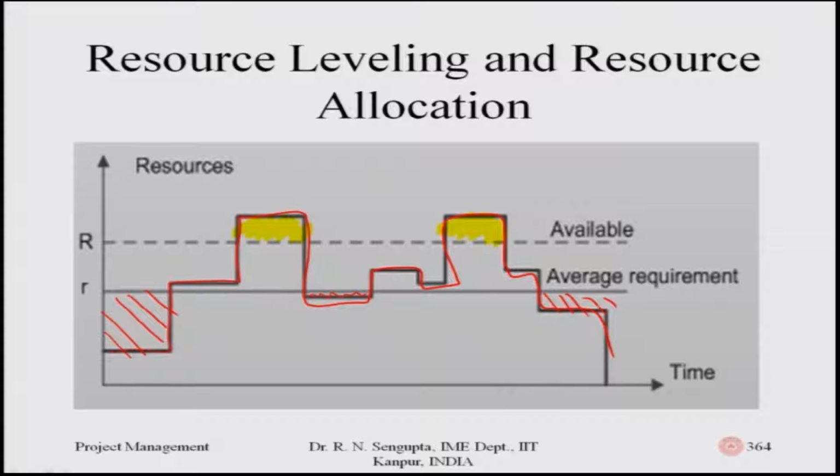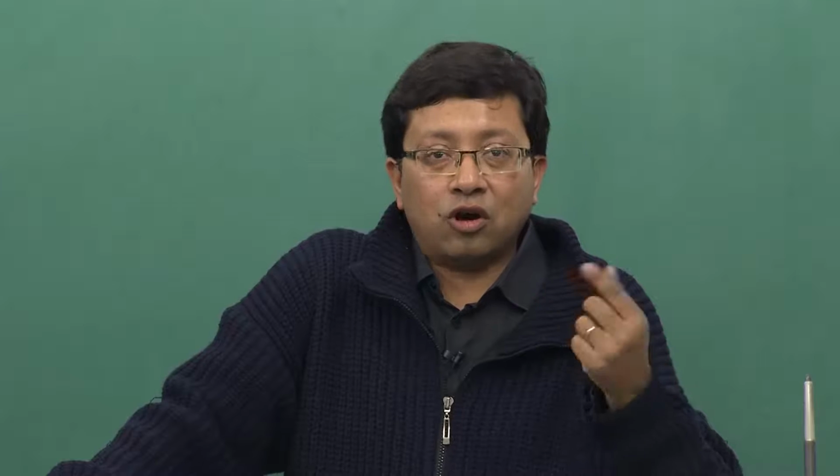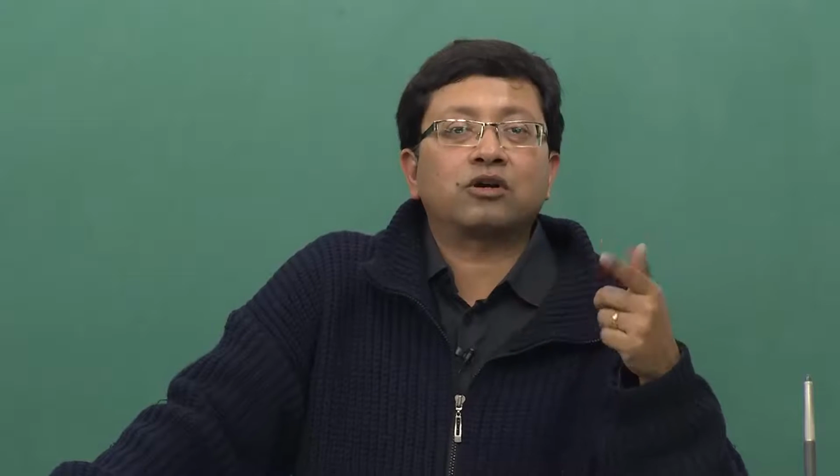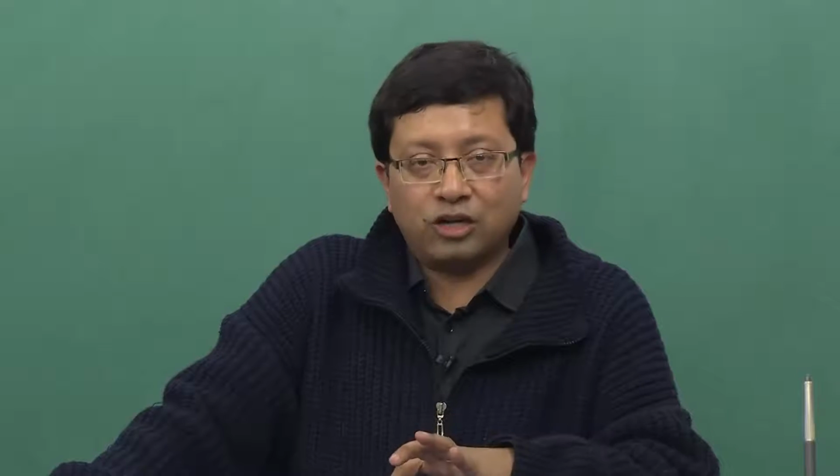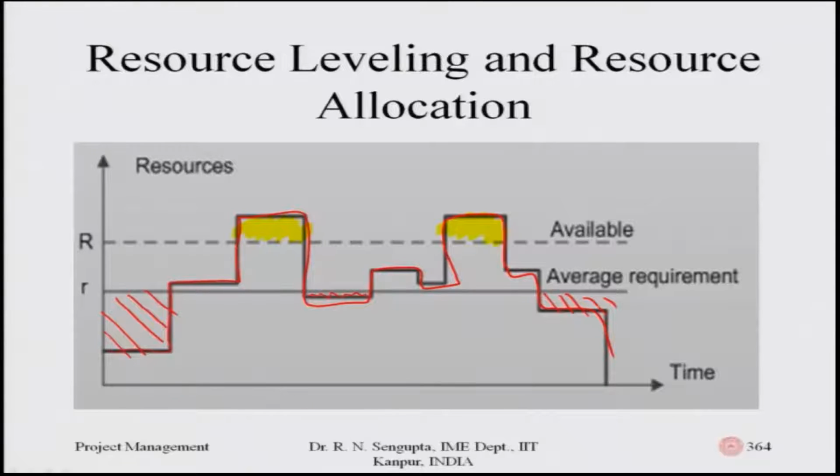So, if I see the yellow part, it may mean that I may have to offload some of my work to a vendor who has that type of CNC machines and who can give me the services for the project which I am trying to implement. There, the overall cost which I need to utilize in order to offload that quantum of work to the vendor can be found out for the portion which is marked in yellow felt pen here, such that I can find out what my cost is if I offload that work to that vendor,